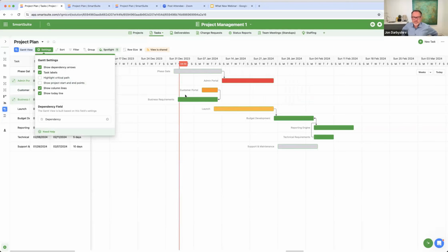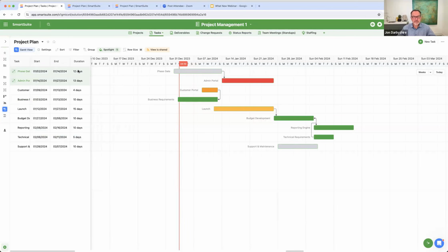What is coming that we weren't able to get out just right now, that we're fine tuning a little bit, is the ability to hide weekends, and then for us to use that information in duration counts. So you can basically skip weekends and just say, I need this duration to be 12 business days. And you're telling us what business days are. We're also going to have the ability for you to enter holidays.